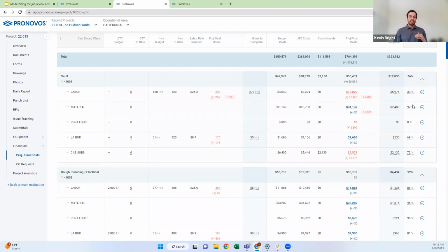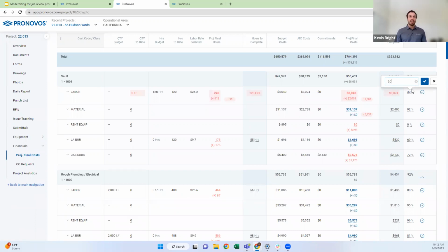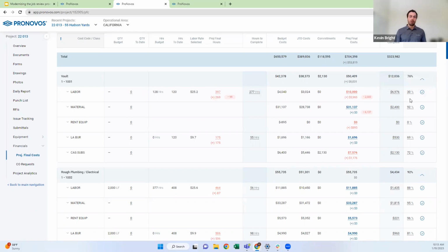The third way is if you don't know necessarily what my cost to complete is, you may know, gut check wise, what's your percent complete? So if I go in here and say, all right, rather than 30% complete, I am actually 50% complete. I can go in here and it says, all right, if it took you $3,000 to be 50% complete, that means it's going to take you another $3,000 to be 100% complete. So your projected final cost is now going to be $6,048. So those are some of the modifications you can use focusing specifically on the cost side of it.